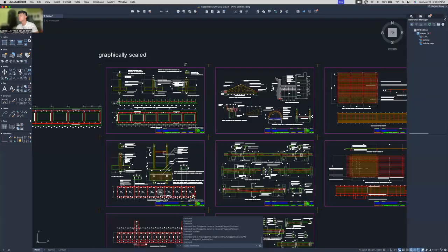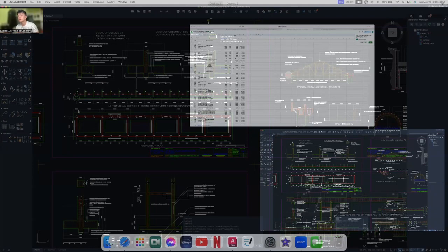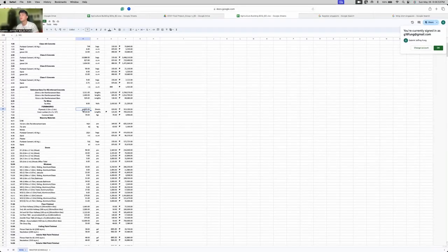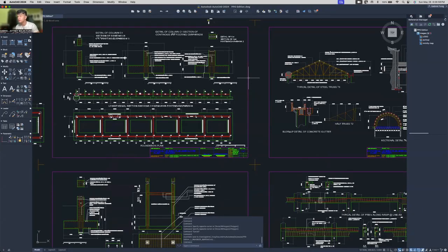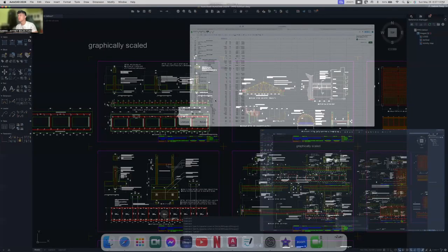For the plywood, for the formworks, the thickness is given and then the total length is given. So we'll just multiply that to acquire the area, after which I divided that by the plywood area. It came out to a total of 505 pieces of 1.2 by 2.4 plywood. For the coco lumber, I utilized a ratio and proportion, same with the common nails, to acquire the number of coco lumbers needed for this structure. So thank you to the reference that was very useful in computing these parts.